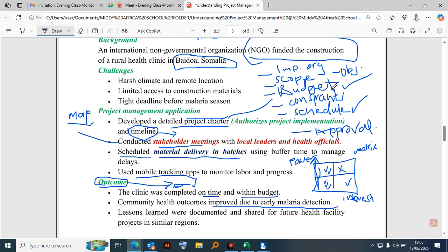Project Charter is not a one-man show. It is developed by different stakeholders. In the project charter, we have the donor, or the person sponsoring the project, who must be there, because they are the ones who will authorize the project to proceed to the implementation phase. He will need a project manager who is going to confirm that whatever has been incorporated in the project charter